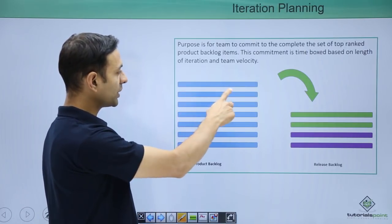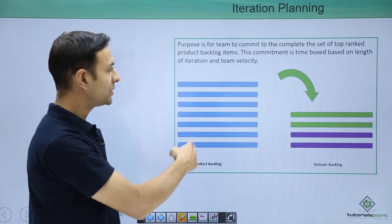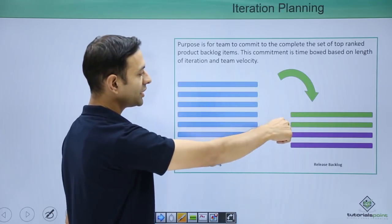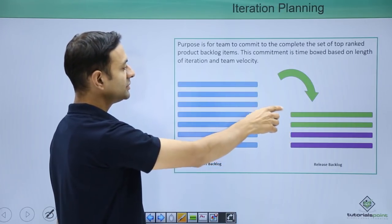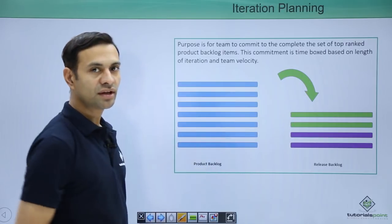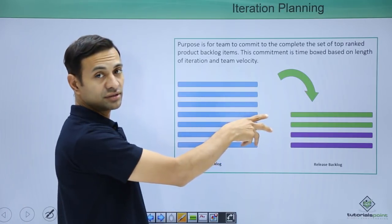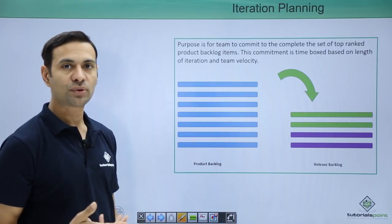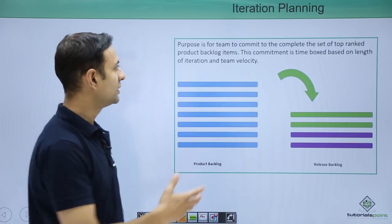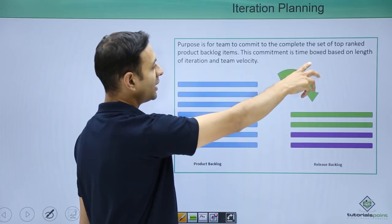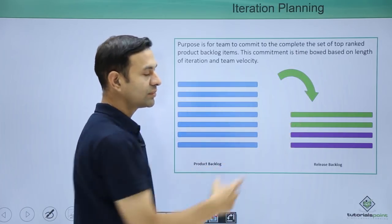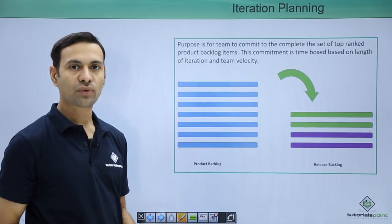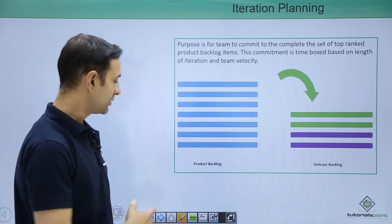Here we can see our product backlog has a set of features which are prioritized or ranked, then these are going to move into our iteration. This commitment is based on the length of the iteration and team velocity — how many points a team is supposed to do in a particular iteration. We have a time box because an iteration is 2 weeks or 4 weeks, and your velocity is basically 10 points or 14 points based on your past experience.